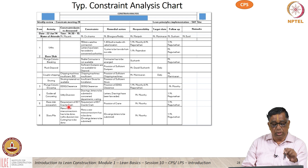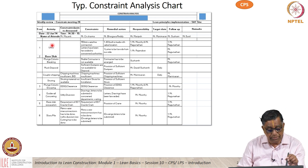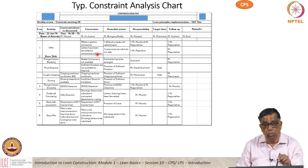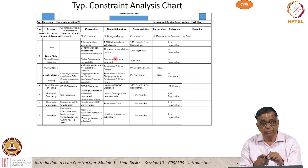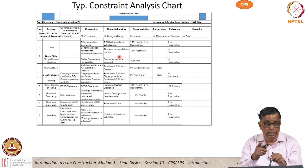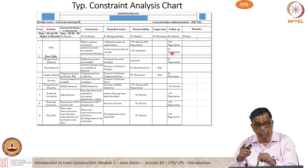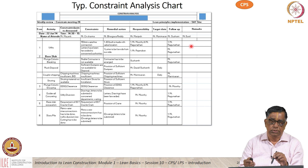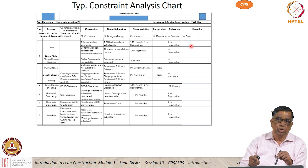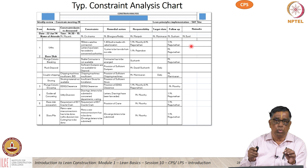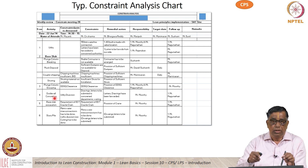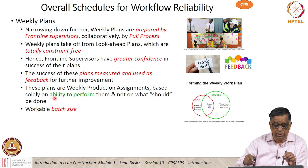This is the typical constraint chart. Looking at the various columns, we have the activity, the actual constraint, what kind of remedial action is required, and whose responsibility it is — the person is identified well in advance. This constraint for a given week is being analyzed five or six times before the actual work. Then we have the target date, and we keep following up every week, writing remarks on done or not done. With constraint analysis done five times before my sixth week, I have every chance of removing all constraints and arriving at what is called a totally constraint-free basket of work.